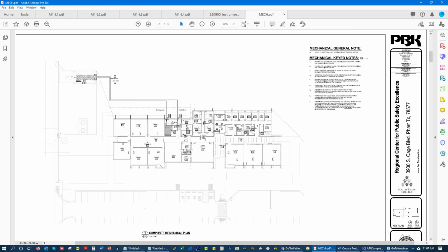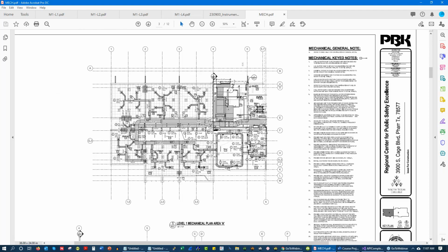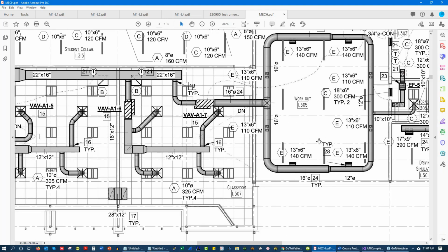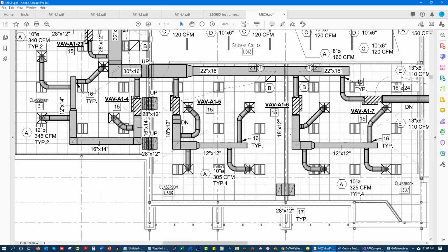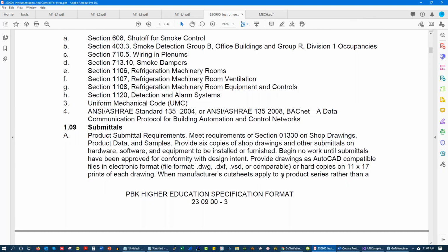If I'm sitting down with my electrician to lay out a network diagram, I'm going to start understanding where my boxes are, where my sensors are, and where potential additional controllers are. So I can start to figure all this out and get a feel of what I'm looking at. From there, I'm going to look at a scope of work document, what was actually sold, and then I'm going to move through a specification.